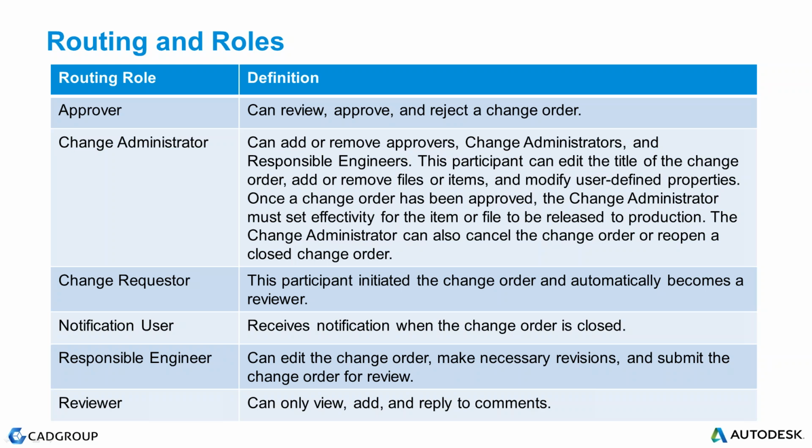They're just notifications. The responsible engineer is the guy in charge of actually doing the change. So once the change administrator has said, yes, let's make the change, it then goes to the responsible engineer, and they actually do the change and then submit it for review. And then finally the reviewer. The reviewer can just simply add, view and reply to comments.